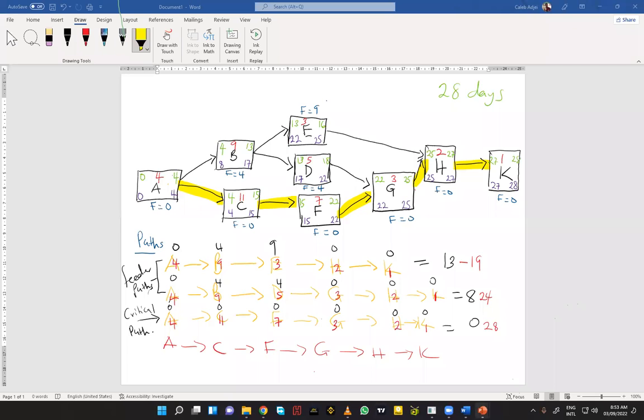So quickly, without wasting much time, let's look at the Gantt chart. The reason why there would be a situation where there is no critical path? Definitely there will always be a critical path. The definition of the critical path is that it is the path with 0 float. Or the path with the least float. For instance, assuming the float for this path wasn't 0, but it was 10, then we'll choose the one with the least float, which would have been this path. So the definition of the critical path is the path with the least float, or the 0 float, or the longest path among the various paths that we are able to identify.